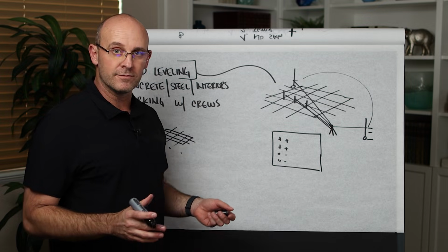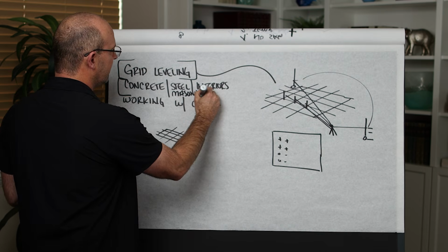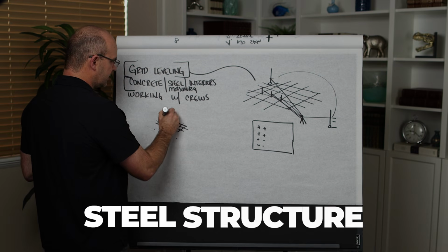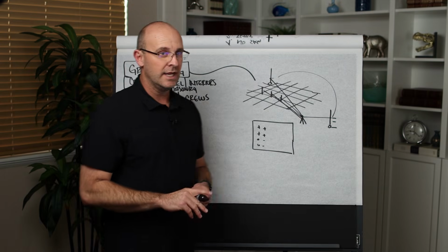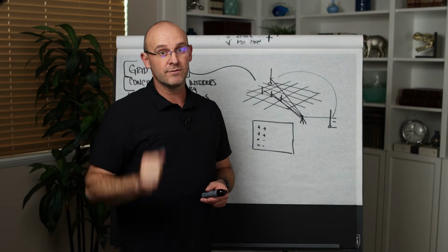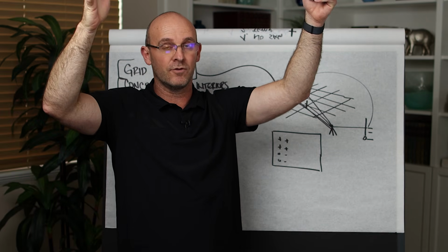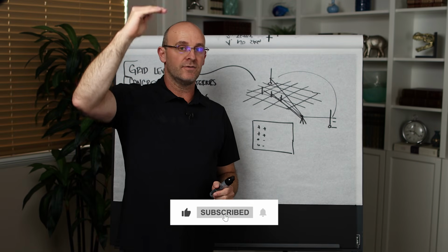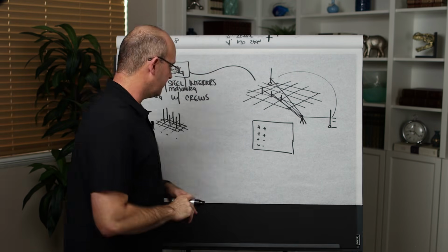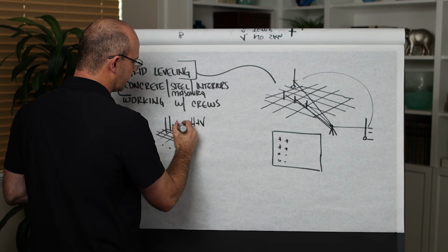When steel comes on the scene, they're just as involved. And I should actually say steel or masonry, because typically you'll have a combination of the two. When your steel structure goes up, those field engineers are very much involved in checking the edge plumb of the building, seeing how much the heat is affecting the overall horizontal dimensions, and helping to control the elevations as we go up, especially for slab on metal deck. So I'm going to call that horizontal plus vertical control through the structure.